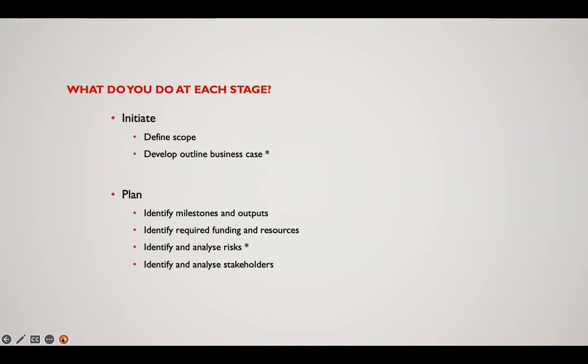Then you have a live document, which is called the risk register. From this point, you start identifying the risk in the project. You start putting it into that register. I won't go into more detail about that. Every risk register is a live document throughout the life cycle of a project. So everybody gets involved. If you see it, write it in the register, and put the actions, who is going to action it, and how do we mitigate against that risk.